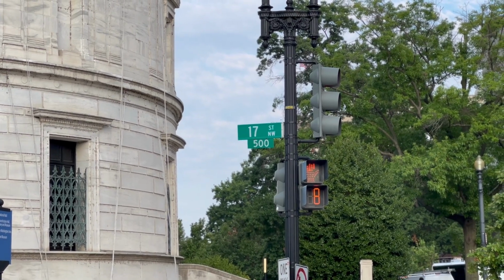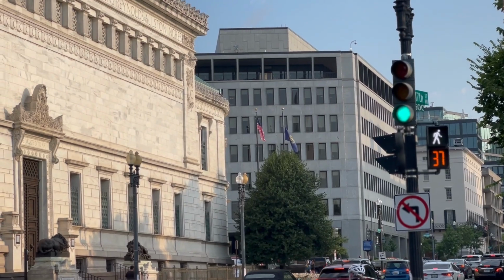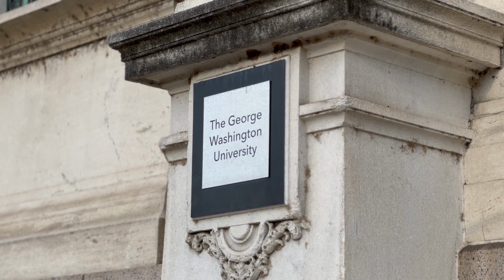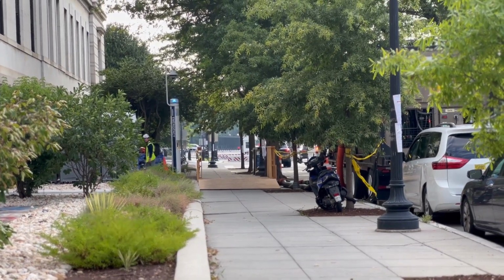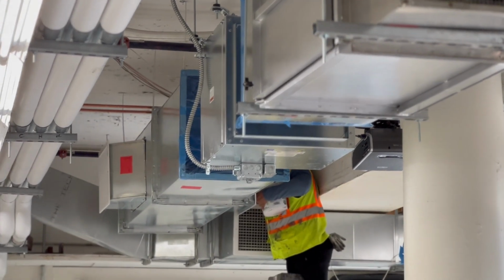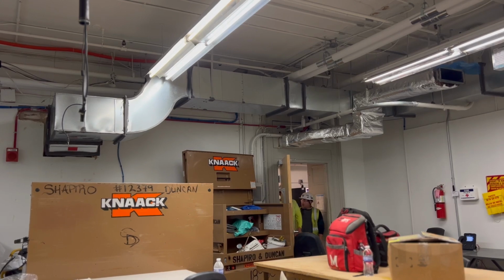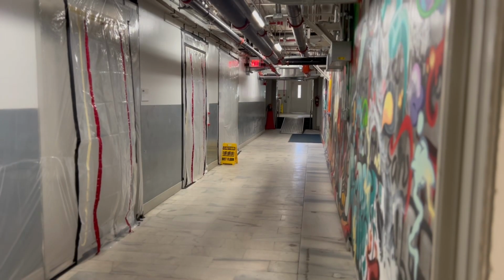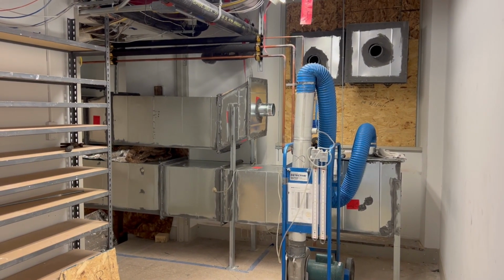The design build method allows for a faster project delivery. The term fast tracking is used to describe being able to accelerate different parts of the project in order to make progress more quickly. We assist the owner at managing their goals. We don't have a secondary party or an intermediate party, so that also marries nicely with scheduling. When you start eliminating contractors through that process, your scheduling then becomes shorter. Administrative processes don't take as long to work through.